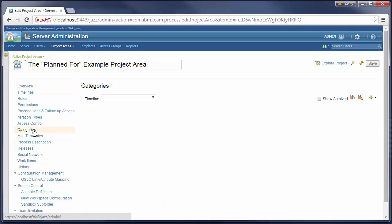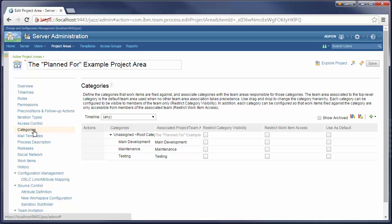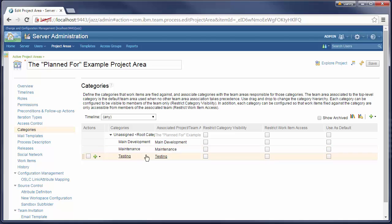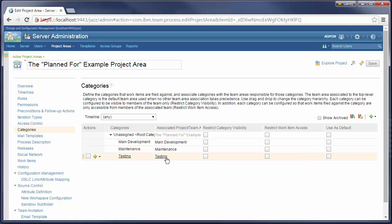In the categories tab I define three categories. Each category is associated with a corresponding team area. Note that this means that category is indirectly associated with the timeline.